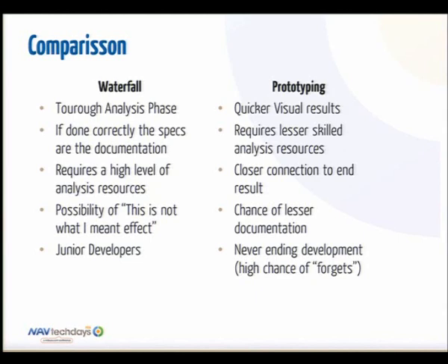It requires a very, very high level of analysis resources. You cannot just send a junior consultant or a junior manager to do the specification. It really needs to be done by someone who knows the functional requirements, but also knows technical requirements and possibilities. And there's a high possibility of the "this is not what I meant" effect.